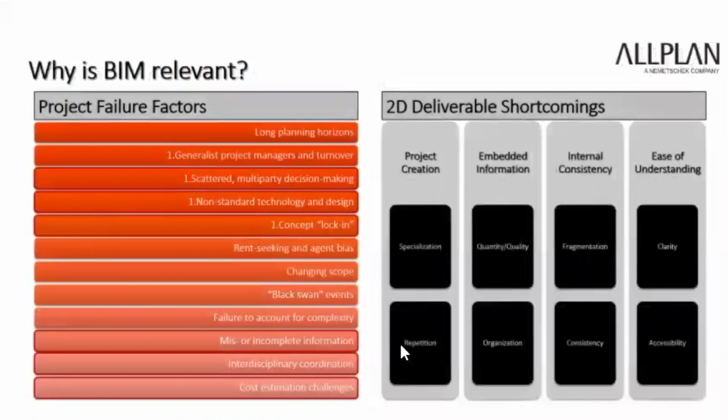So how do these tie back into the reasons that projects fail or the reasons that they become expensive in the first place? Well, I would say, for instance, that the shortcomings in creating a project lead us to think that our projects are unique. It takes so much time and so much effort to find old similar projects and then to understand what was done there that in many instances it's not even worth doing, or at least we don't perceive it as worth doing. So unless you have personal or institutional experience with a similar project, I've very frequently seen that people tend to just think, all right, well, let's develop a solution from scratch. It's almost like reinventing the wheel.